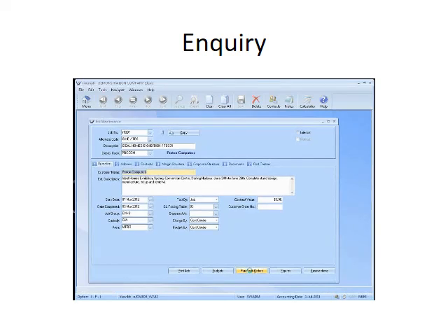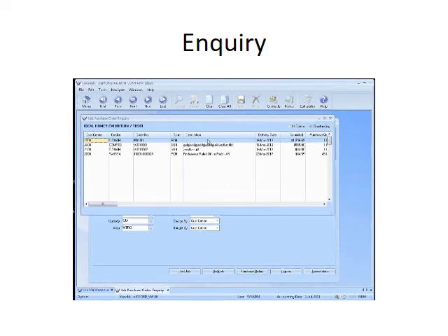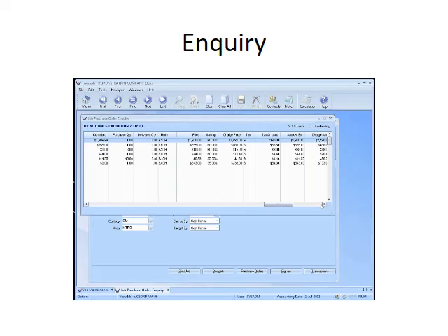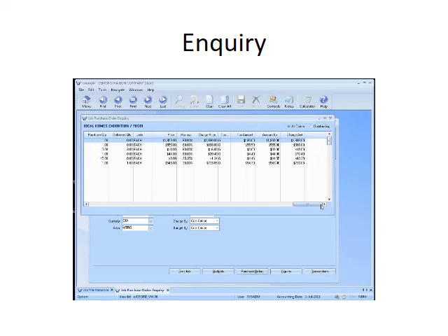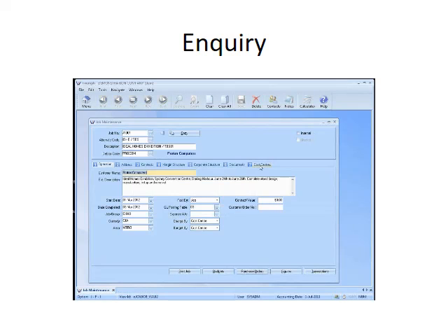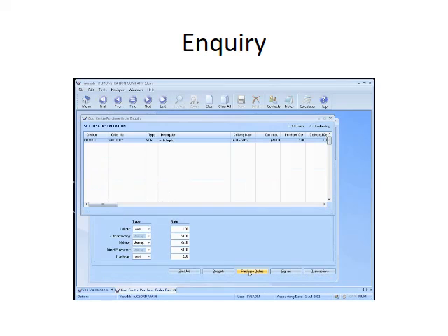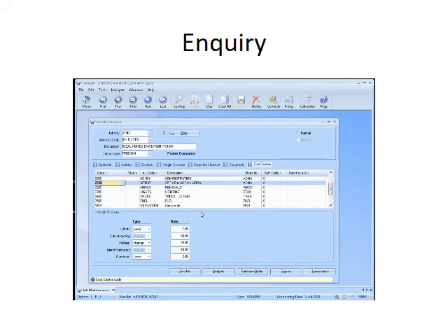I can look up purchase orders. What are all the purchase orders that are outstanding on this job that haven't yet been fulfilled? I can have the outstanding ones, or I can have a list of all of them even if they have been filled, and it will give me details, like what's committed, what's been delivered, and what's outstanding. It gives me the ability to track it. Same thing if I click on the cost centers and hit purchase orders here, it gives me what's outstanding on the purchase orders for the setup and installation area. And you can do that for any of the sub areas.